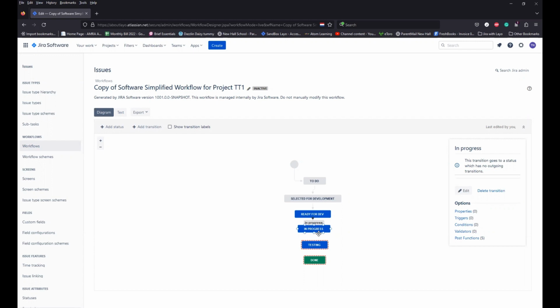Yeah. So those are the kind of information you would need at hand before you go into creating or updating your workflow. Once you have all that information, then you can begin to understand, okay, what steps do we need to take? Do we need to go from in progress straight to testing complete? Is that possible? No, your testers would say, oh no, every single ticket that has been completed from the dev point of view would need to go through an NFT, would need to go through tested. You understand? So that in itself is a mandated step rather than you just saying, yes, dev is complete, now go to QA complete. No, you don't want a transition allowing people to just go straight to the QA without it going into the queue for the QA team to do what they need to do.